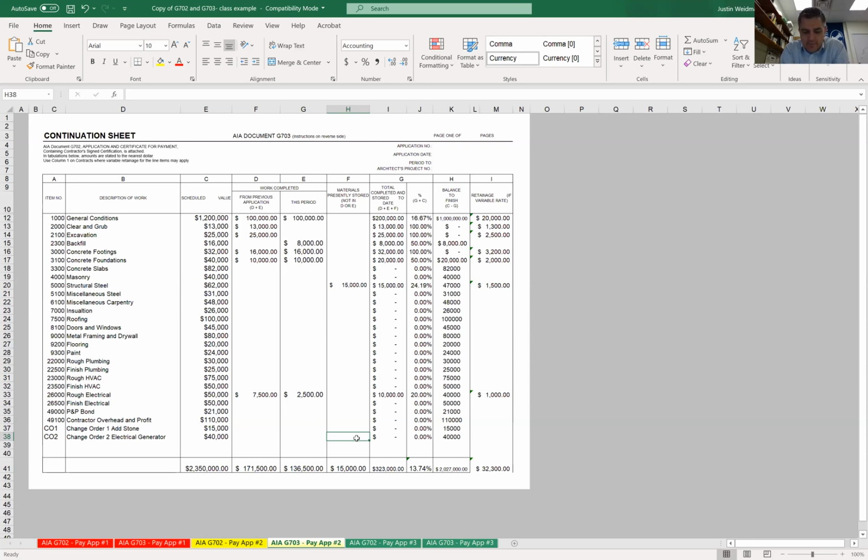And so the basic rules are completeness and accuracy in terms of billing. It's important not to do work until payment is received. Like I mentioned before, lots of contractors went out of business because they kept financing owners' projects. They didn't get paid 1 month, and they just kept working, and the owner kept promising, yeah, we'll get you paid, and then all of a sudden it's 3 months out, and the contractor's put in $1 million worth of work and hasn't been paid for it, and they aren't able to absorb that, and they end up going out of business.